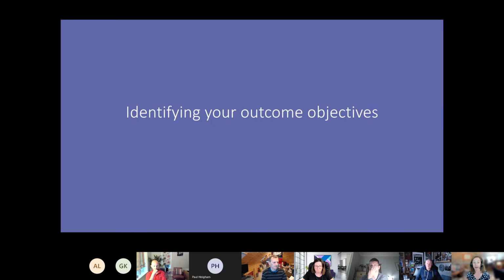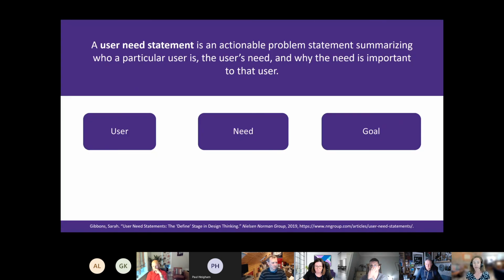As I promised a bunch of times, I keep talking about outcome objectives. So let's talk about how we define them. This works not only for the maturity model and figuring out what goals you have, but it's also something I do before every single site build with any group that I'm working with. These user stories help us outline the goals of the personas into a feature list, and they truly serve as our North Star as we focus on what's critical for that project.